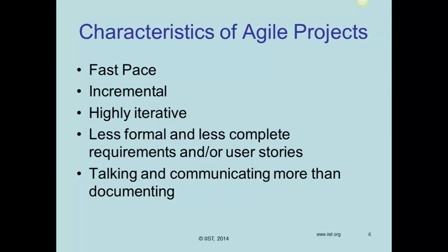Now, iterative is different in the sense that we're not sure exactly if we understand everything about the requirement upfront. We're not sure that we captured everything that the customer wanted. So as a result, we're going to follow an iterative approach, meaning that we're going to build something that we believe would meet the customer needs. And we will present it to the customer in a session that's sort of a prototyping session or a show and tell session, whatever you want to call it. And we receive feedback from the customer, and based on the feedback, we go back and revise what we have done, go back one more time, present it to the customer, and go back and forth, back and forth.